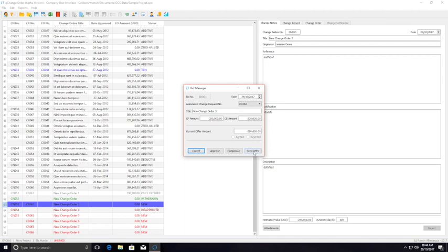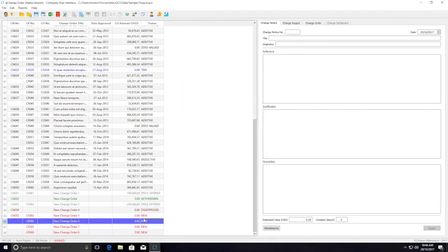So we're going to offer him, because the change he wants is already very low, so we can send the offer to him. The contractor must agree or reject our offer before we can approve. So if we check this, it will actually go to PBM. I'll explain that later. Okay, so send offer.